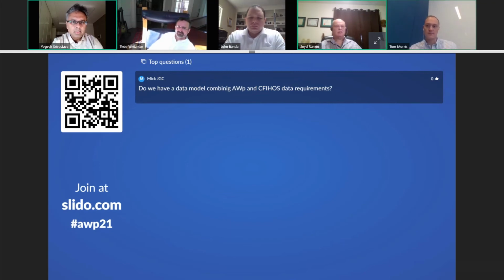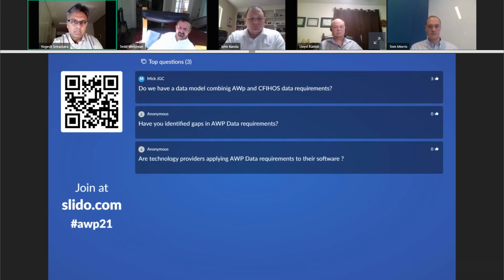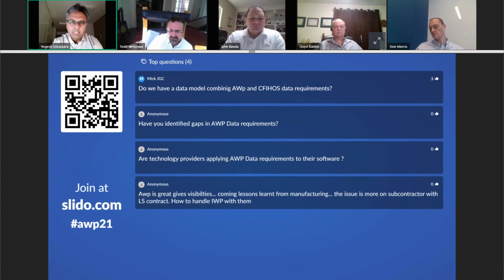Great. Yeah, I can add to that. Go ahead. I think if we are looking at as soon as you sign the contract, where do you begin in terms of data or standardizing on it? Tom touched on it. It is the coding and numbering that you start off with: the work breakdown structure, the model naming convention, the work package numbering, etc.